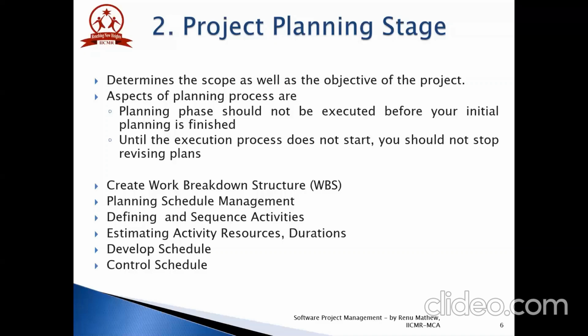The last stage of the planning phase is control schedule. It is the process of monitoring the status of the project activities to update project progress and manage changes to the schedule baseline. If changes are required to the schedule, they must go through the change control process. The schedule should be managed or controlled by the manager proactively.